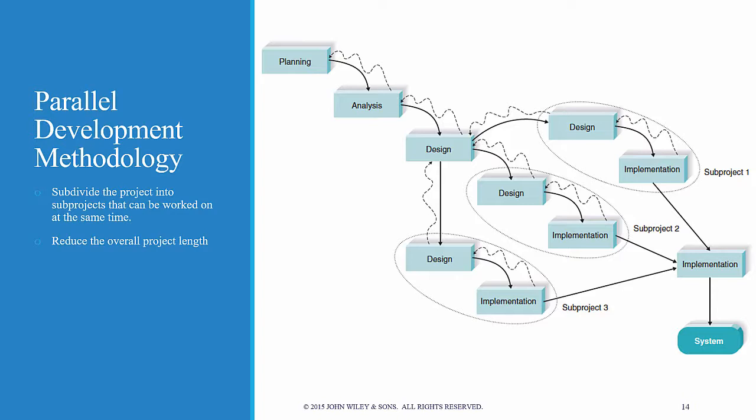One variant of the waterfall approach is the so-called parallel development methodology, where you subdivide the project into sub-projects that can be worked on at the same time, which often reduces the overall project length. As you can see in the picture, after the analysis phase, a general design for the entire project is developed, and then the project is divided into a series of sub-projects that can be designed and implemented in parallel. Once all the sub-projects are complete, there is a final integration of the separate pieces, and the system is delivered.